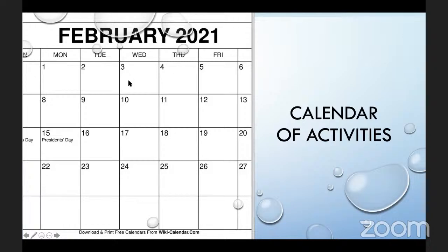So when we say calendar of activities, we can have a 2-week cycle. So maybe February 2021, Monday 1st, when we say we're doing a 2-week cycle, that means from the 1st to the 12th, Friday the 12th of February, right? So that is 2 weeks. So by Monday 15th, we're starting a new sprint, right? Monday 15th, we're starting a new sprint.